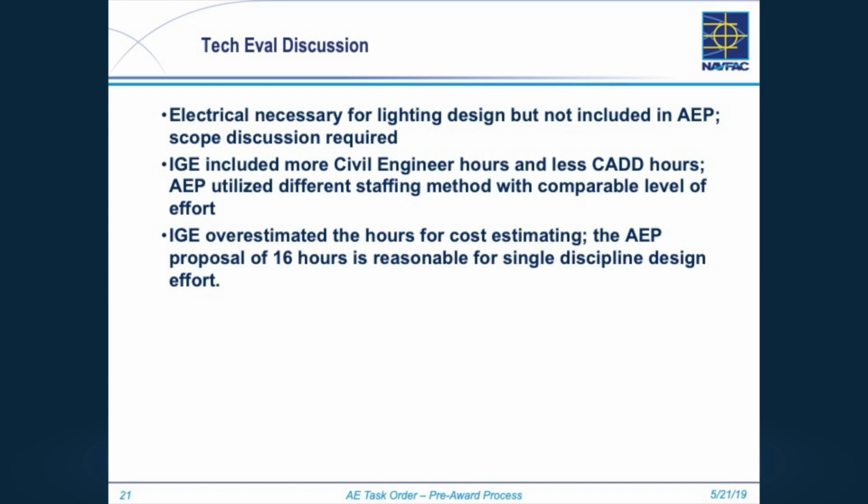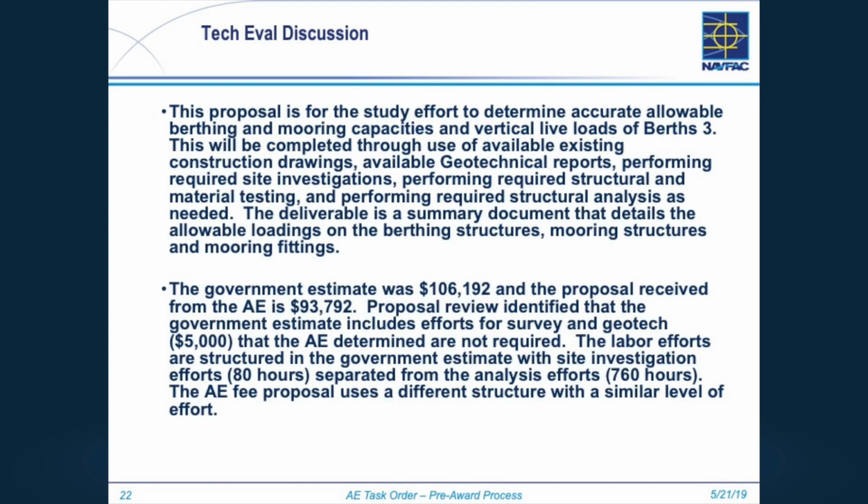Maybe it was just an oversight on their part, but you write it up, and there's a couple different things here. In this case, we had more, because we do things in-house, we don't tend to put a lot in CAD because we don't do it that way in-house anymore. We're getting better, but it might be that some of the stuff we had in the disciplines for the engineers, the firm is able to do with a CAD tech. So they've got a whole lot more hours in CAD and a whole lot less in the engineering. And level of effort is there. These were just a few.